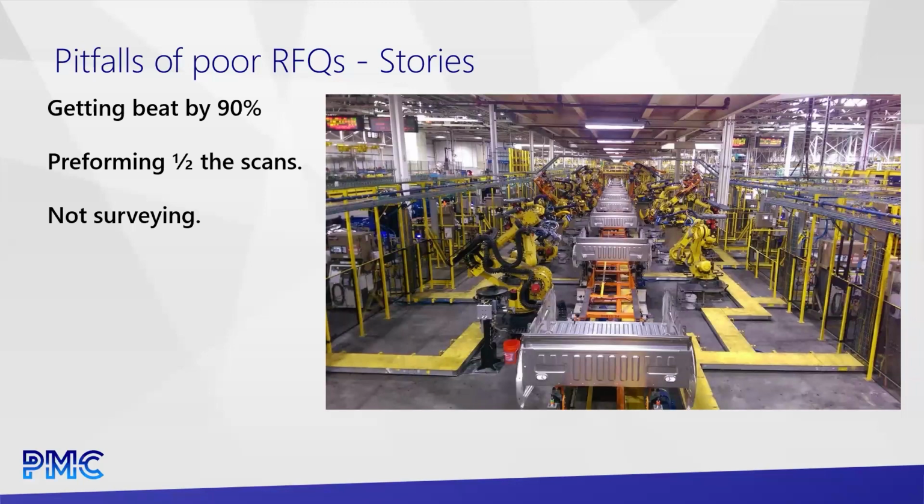So these people had planned out, and apparently they counted half the number of scans that we did. They gave what they thought was a reasonable estimate, but they hadn't done this scale and size and complexity of a job before, and they just grossly underestimated the number of scans it was going to take to do the work.